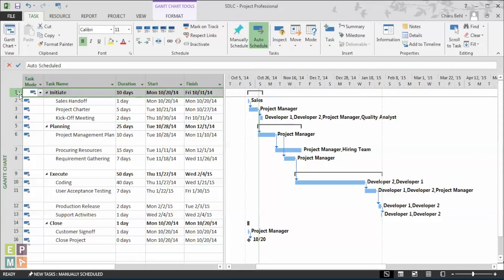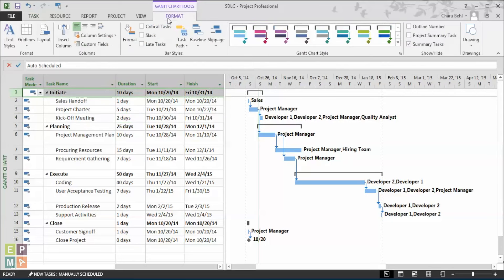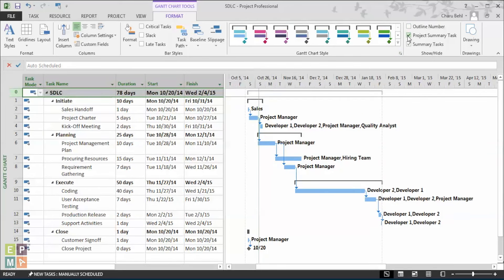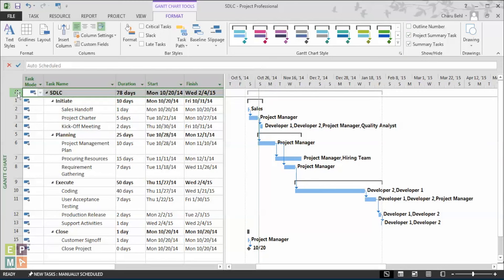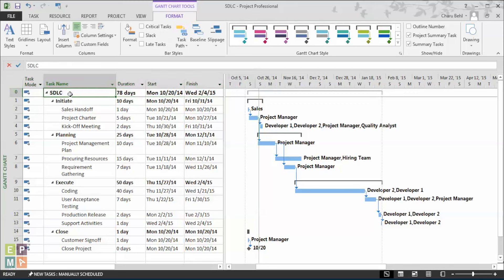Now, what if you want to see the overall information of your project? To view that, you simply go under the format ribbon and under the show and hide section, just select project summary task. And you'll see at row 0, all the project information is automatically generated.